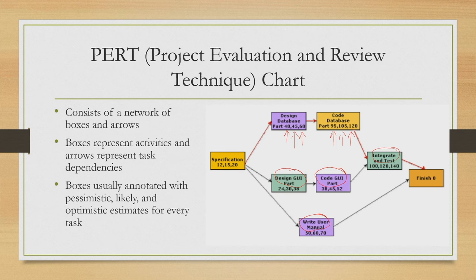Now, the advantage of having this PERT chart instead of a simple activity diagram is that here we can actually come up with better estimates of the project completion time, along with some time overrun limits that we can estimate. So, pessimistically what time it should take, that is the longer time, optimistically what time it should take, and the likely estimate that we have estimated earlier. So, it will lead us to a better estimation of the total time required to complete the project from this dependency diagram. So, the PERT chart is a better way to represent the time schedule than activity networks.